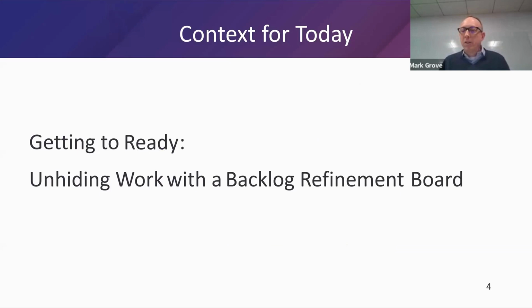And I want to make sure we ground ourselves in some of these words and some of these concepts. So the first one I want to talk about there in red is, what do I mean by ready? Within this context, I mean the definition of ready, and we'll show that in a minute. Lots of times teams should have a definition of ready. A definition of ready is the criteria which the team has agreed that this user story or this work item has met before we do anything further with it. Usually before we pull it into a sprint or before we actually, quote, work on it. We'll talk about what that means, but for now, we'll just leave it at that. That's what I mean by ready within the title of this presentation.